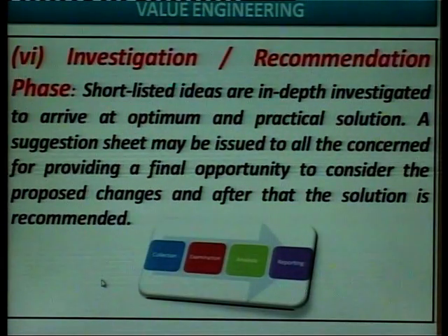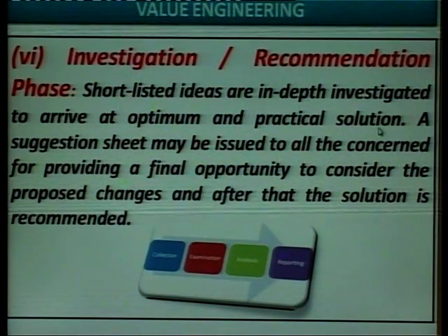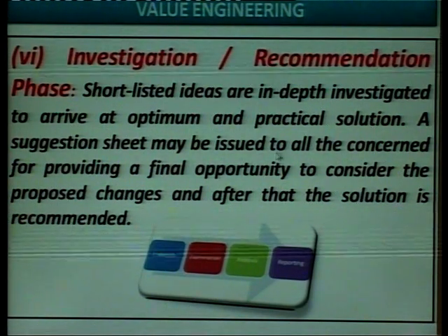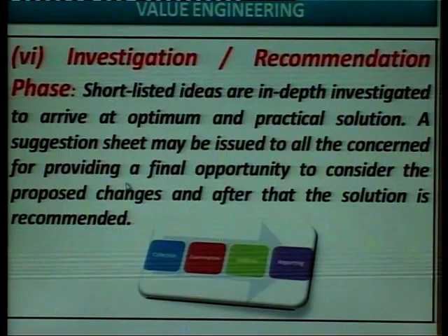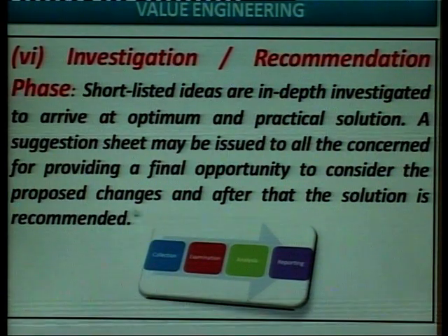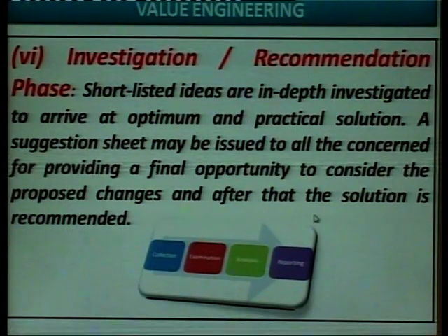Next is investigation or recommendation phase. Short-listed ideas are investigated in depth to arrive at an optimum and practical solution. A suggestion sheet may be issued to all the concerned for providing a final opportunity to consider the proposed changes, and after that the solution is recommended.